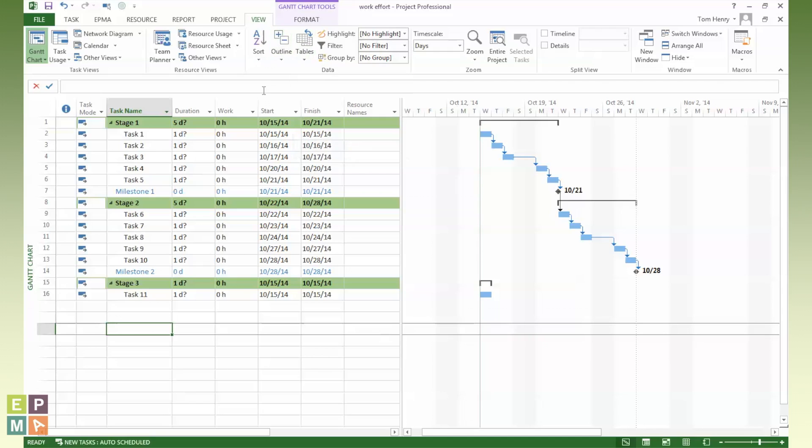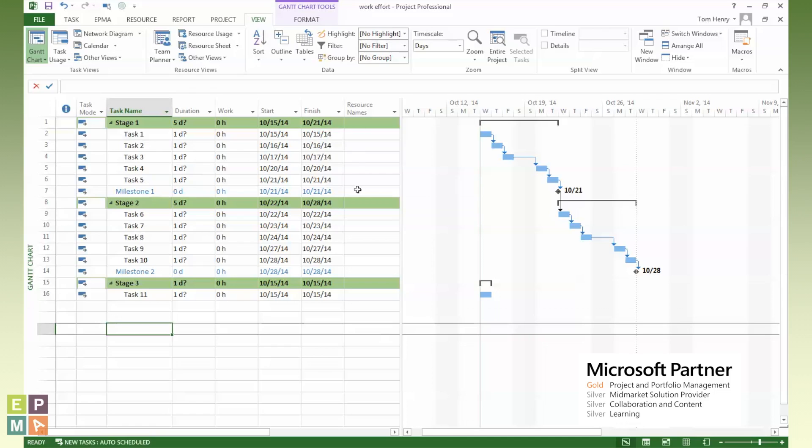Essentially, the view, when I save it, is going to save the tables, filters, and the groups, and the screen layout. So all I wanted to do was make changes to the table, which is this piece on the left-hand side. So I'm now ready to save my view.